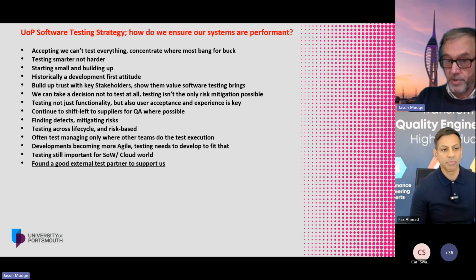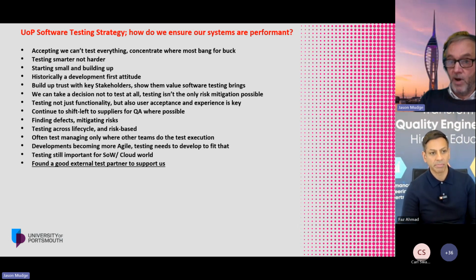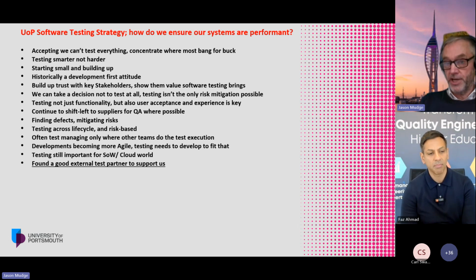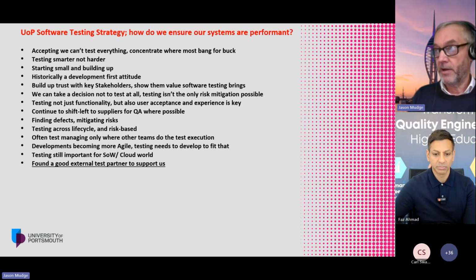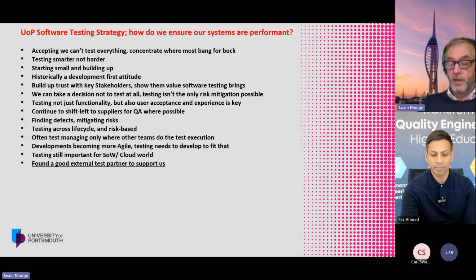And for example, as we brought in test automation, rather than just throw it into a big project and failing, we've introduced like 4 or 5 proofs of concept, and then we built up our expertise and also trust of our customers. And then we make it bigger from there.